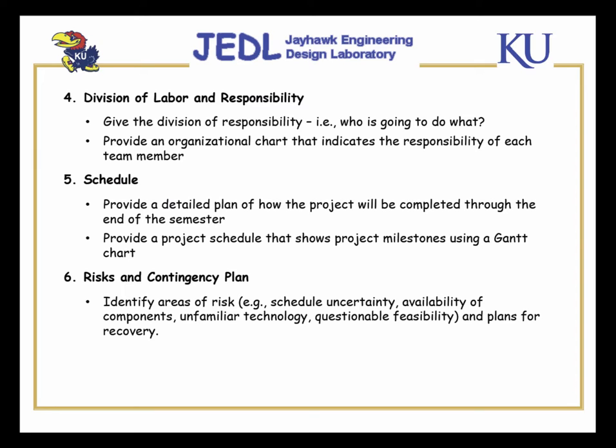and just keep those activities at a higher level. And then finally, provide a risk and contingency plan. By that, I simply mean identify the parts of this project that you think you might have the most difficulty with. What are the things that you're a little concerned about? Maybe it's someone else that you're counting on being involved, an external person to help out in some particular way.